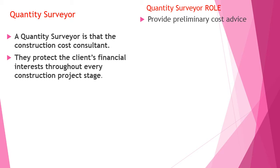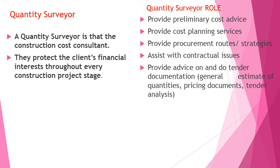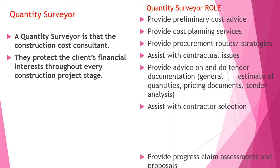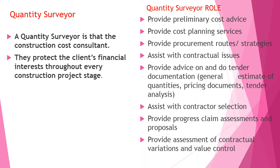The Quantity Surveyor's roles include: provide preliminary cost advice, provide cash planning services, provide procurement rules and strategies, assist with contractual issues, provide advice on and prepare tender documentation such as estimates of quantities, pricing documents, tender analysis, assist with contractor selection, provide progress claim assessment and proposals, and provide assessment of contractual variations and value control.